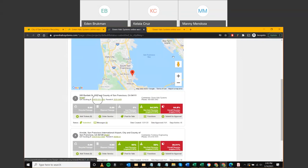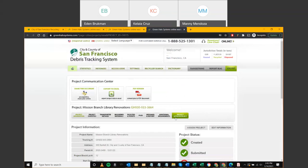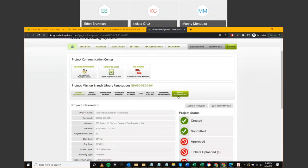The main takeaway is: review the information filled out by the contractor. If it's acceptable, click 'Approve Plan.' If not, click 'Reject Plan' — this returns the project to Upcoming so the contractor can make changes and resubmit. Ideally, you'd like to see a plan with 90% or higher estimated recovery, a good selection of materials and transporters.